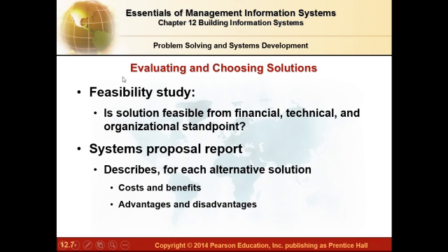Okay, the next is evaluating and choosing solution. So is the recommended solution even feasible? Okay, feasibility study. You have to make the feasibility study. Is the solution feasible from financial, technical, and organizational standpoint? A feasibility study helps you determine if your proposed solution is achievable before you spend thousands of dollars.